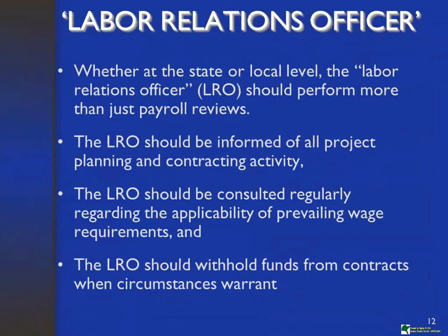the labor relations officer takes on many functions, and depending on the size of your agency and the way you're organized, some of the functions may reside in other departments, as I said before. But initially, at the beginning, planning stages of a project, whoever's been designated as the labor relations officer should be brought in through the planning stages, because oftentimes they're the ones who will be providing the applicable wage decision, and that is based on the scope of the work. So if the scope of work changes throughout, then you may be dealing with some old information.